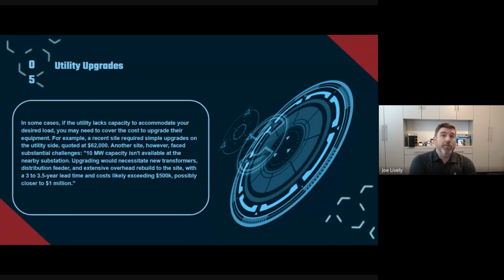The site I'm working at right now, $70,000 for an upgrade. And that's just elbows and interconnection lines and things like that. It's very, very simple stuff. Another one that we were working on in North Oregon, $255,000 is what it came out to be. They quoted us $175,000. We actually built out that site, and by the time it was all done, it was over $250,000. So even if they say it's going to be this amount, they're not going to just eat that cost. They're going to push that onto you because you're the person requesting the service.